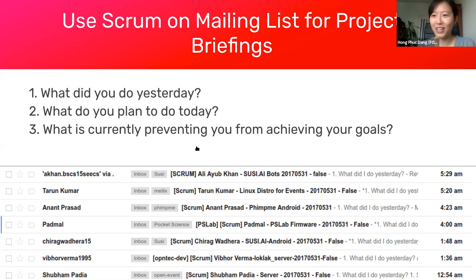They will say what they did yesterday, what they plan to do today, and what prevents them from doing their work. This email is sent out to all people subscribed to the mailing list, so they can get feedback, and other people also see it and get a little bit of a feeling of where the development is going forward.